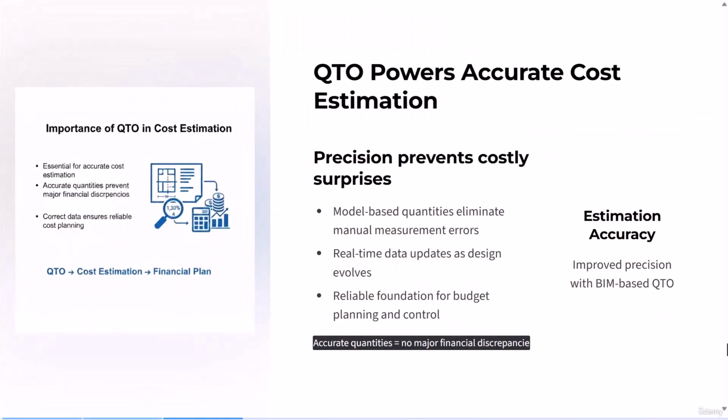But why is this important? This process is crucial because three key project decisions depend directly on the accuracy of this data. So, cost estimation. Number one. In every project, the first question the client asks is, how much is this project going to cost me? If material quantities, concrete volumes, or the number of elements are inaccurate, the cost estimate will be fundamentally flawed.